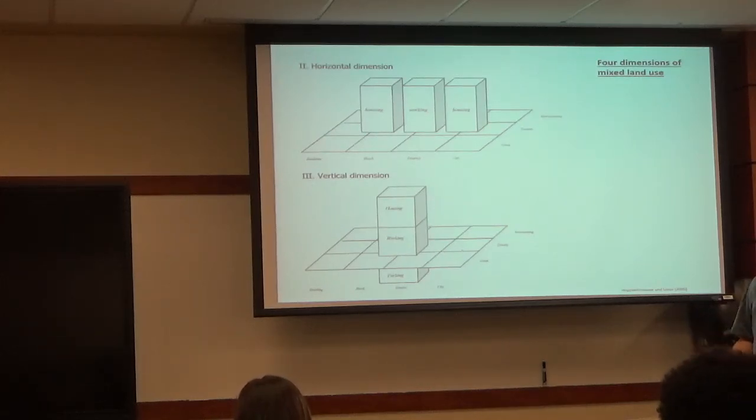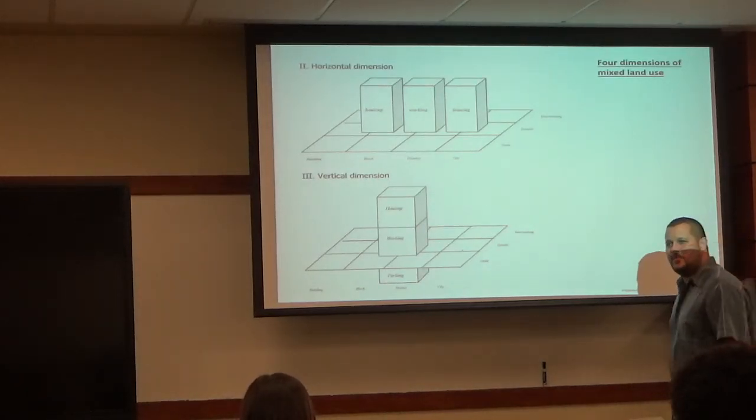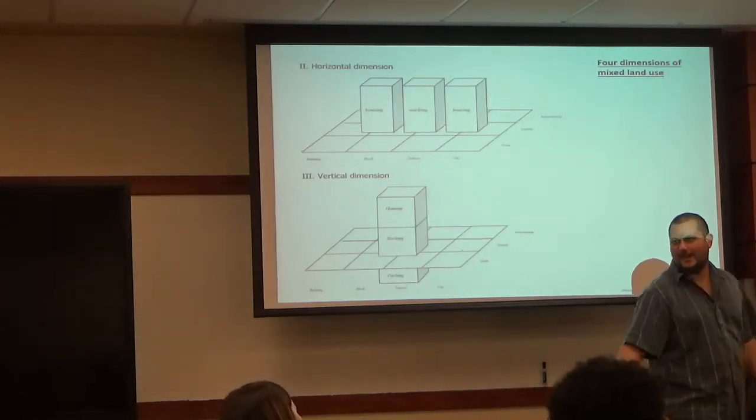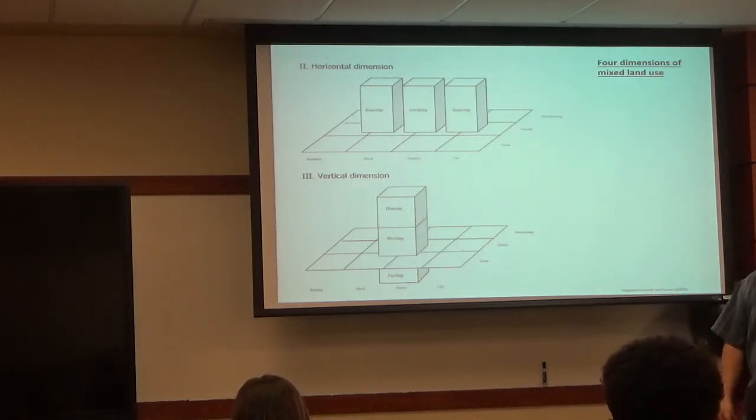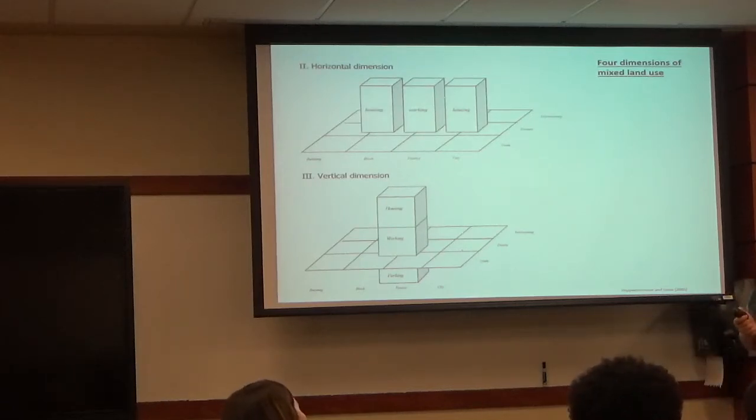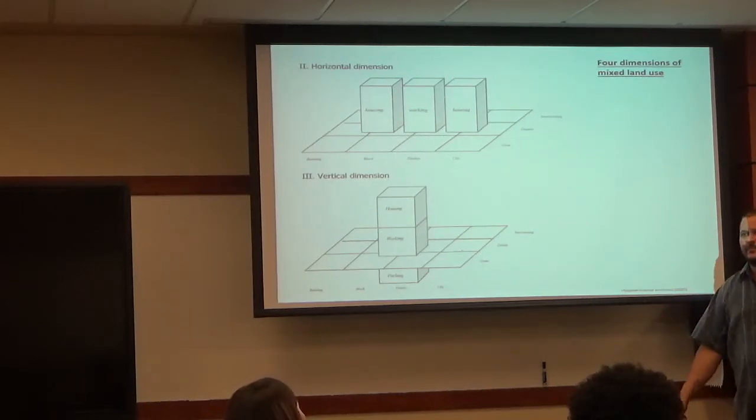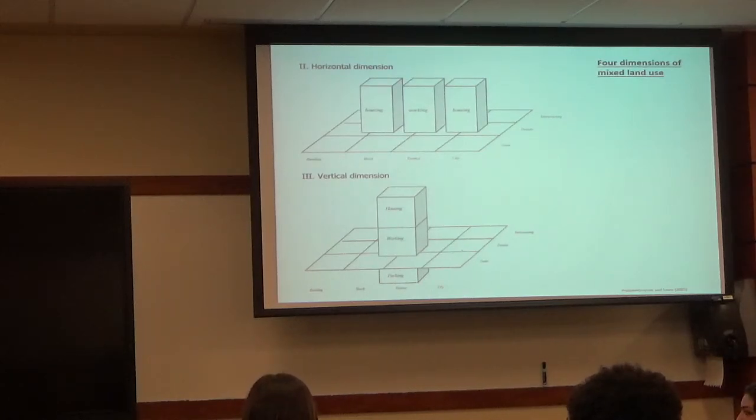That's a good question. There was a town I spent 5 years of my life in. They call the place downtown the so-called hole, because they dug out a hole. Think of this classroom, about 1.5 to 2 times the area, and the same in depth. They dug out a hole, started with the piling, started with the foundation, went bankrupt, bailed out, weird financing, sold, next company, same thing, couldn't deal with it. And then 2006, 2008 happened. There was a site for at least 5 or 7 years, under construction, not used, in straight downtown of a small little town. Think about that, if you would have, let's make it here a campus. Instead of the student union building, you would just have a big hole for 5, 6 years. That's lost income, lost community sense.